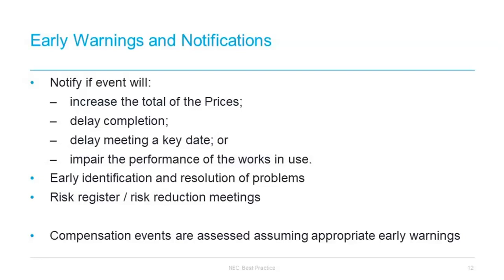In terms of risk generally within NEC, at its base, all risks sit with the contractor, other than those that are compensation events which are contracted for. Educated suppliers understand and can work up detailed risk registers, so they understand risks exist and can manage them.